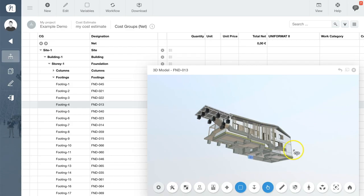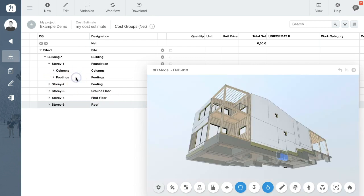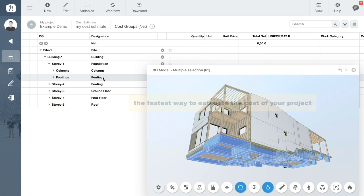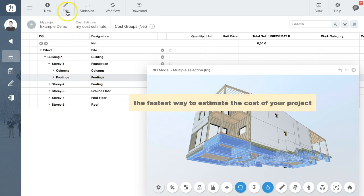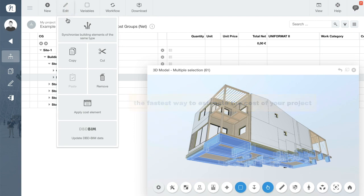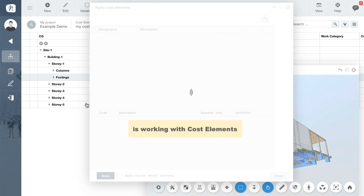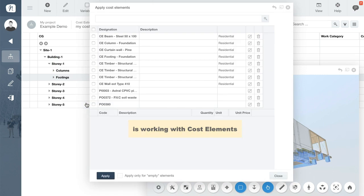Ok, so let's set the viewer back to show all objects and estimate the costs of the project. The fastest way to create an estimate is to connect cost elements to your building components. Click the edit command and choose apply cost element. This opens a list of cost elements.